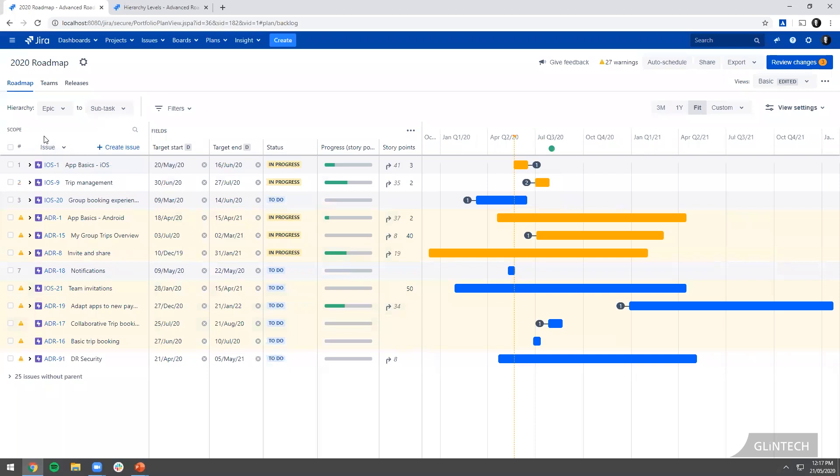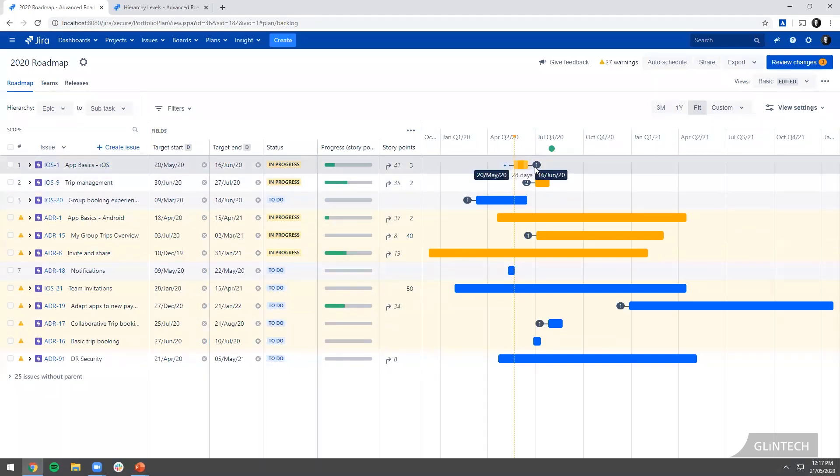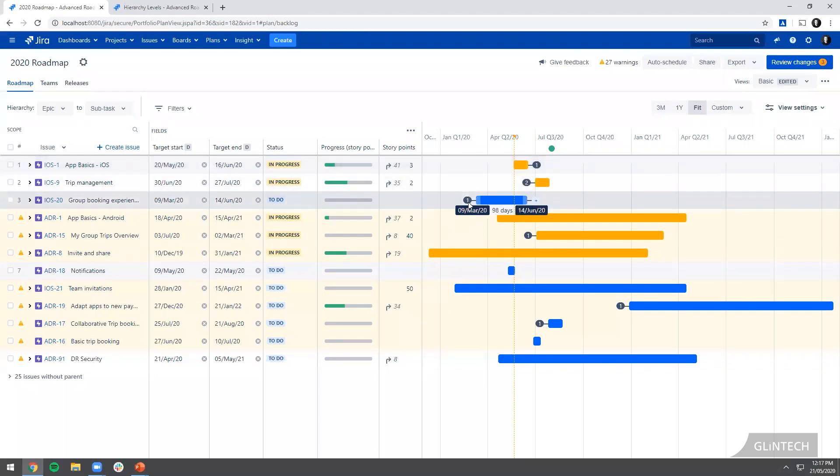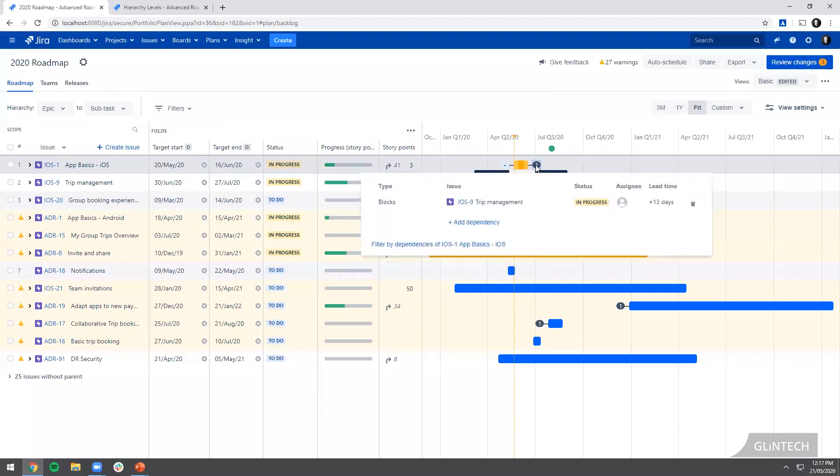In the epic level, you'll see these little badges, these little numbers on the end of some of the pieces of work. That tells me there is a dependency. If it's on the trailing end, it means that this thing is blocking something else. If it's on the leading end, it means it's being blocked by something else.